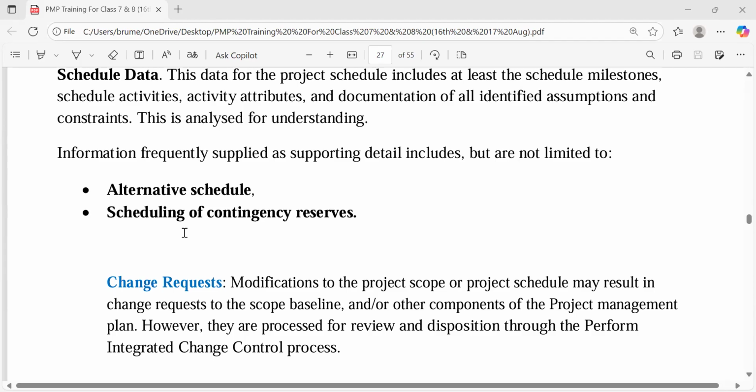But this minimum of 10% is not like you adding it. It must be agreed upon. The team must come up with it as a policy that for every individual activity, a contingency of 10% would be added. And the same thing could be done in cost too, in cost estimate, where for something of $100, an additional $10 could be added, making it $110 for that activity. But this is not the only kind of reserve we have. Contingency reserve is not the only kind.